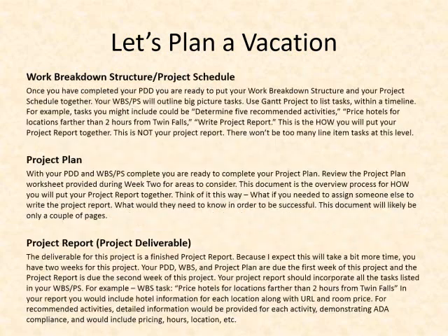to that format. Then you're going to write up the finished project that you've discussed with your client, and that becomes your project definition document, because you don't want to go to all of the trouble of doing all this research, snagging pictures, creating this beautiful report, unless you know that everyone is in agreement basically and you're signing a contract that you're ready to move forward. Once your PDD is finished, you're ready to work on your work breakdown structure and your project schedule. You're very welcome to use Gantt projects so that you can put both together in one document.